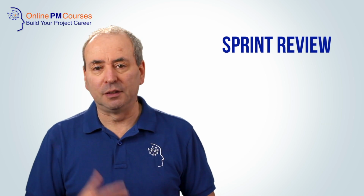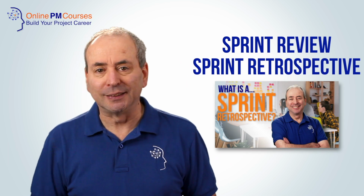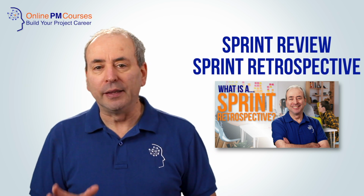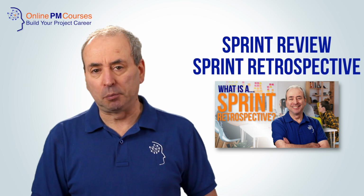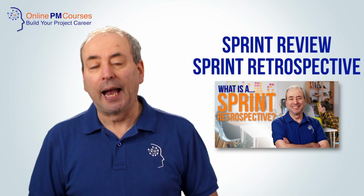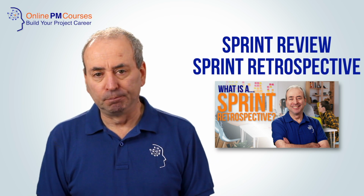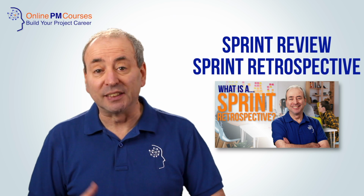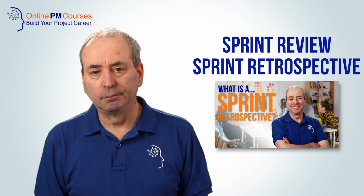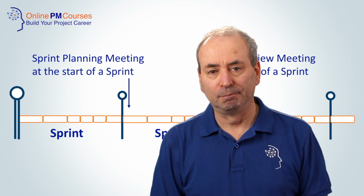Once this has happened, the last event of a sprint is a sprint retrospective. This is where the sprint team gets together to examine its process and to understand what it can learn from the way that they work together in the preceding sprint. This will rarely involve users and outside stakeholders, and it focuses on the team's process rather than the results of what it did. The outcome of the sprint retrospective is a series of lessons learned that the team will implement to improve its process. This, of course, is followed by sprint planning for the next sprint.